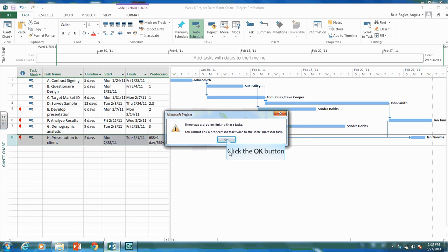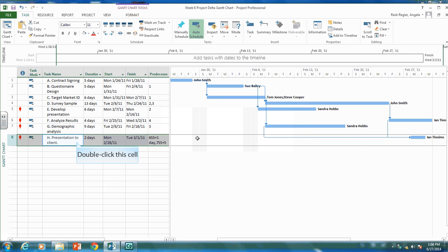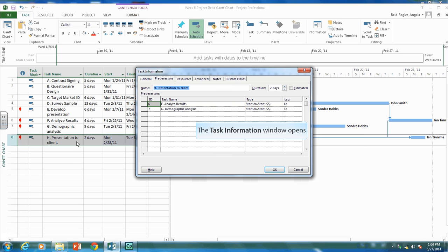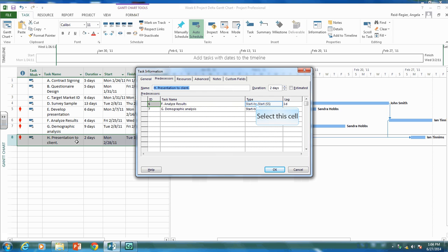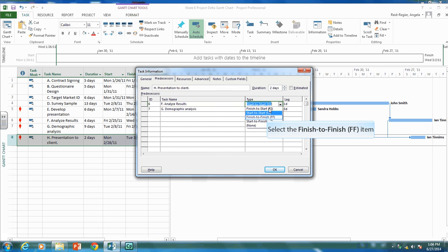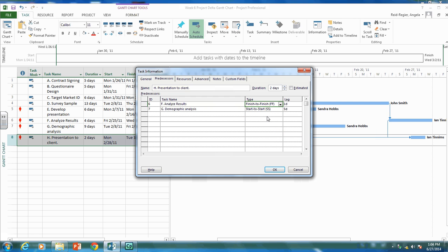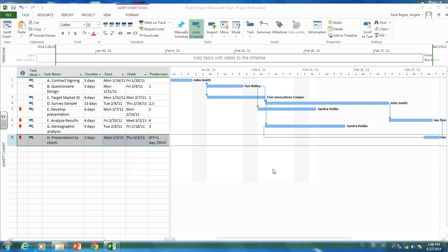So why don't we change this to a finish to finish. So we can do our presentation with a one day lag. So let's see what that does. So we don't need to wait for those activities to be completely finished. And we've reduced our overall project time by applying these different types of relationships and lags. So hopefully this helps you with your deck project. You should be looking for ways to incorporate different types of relationships and lags into your deck project and also assigning resources.